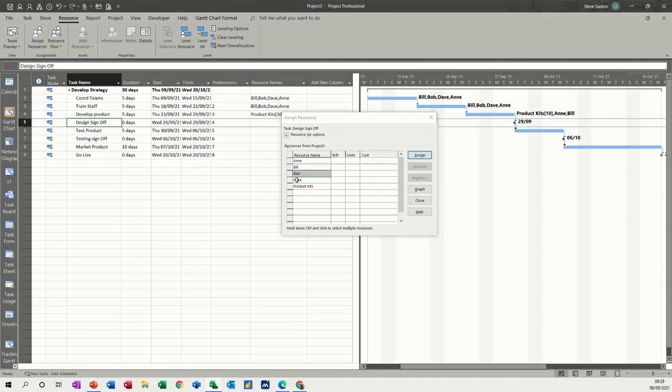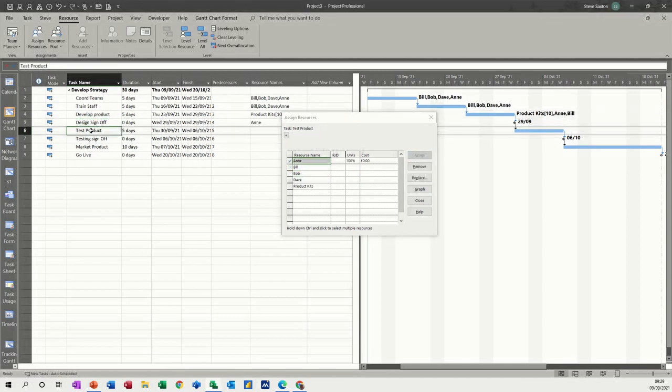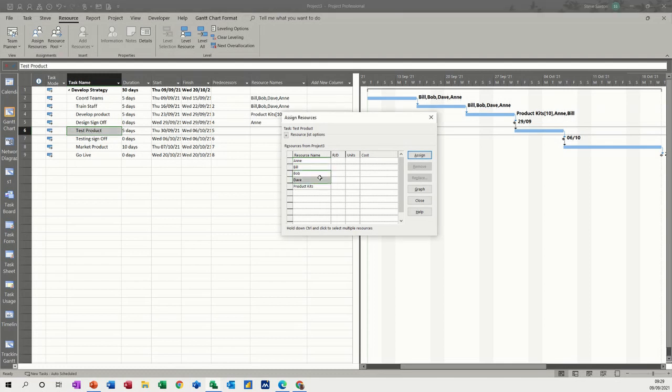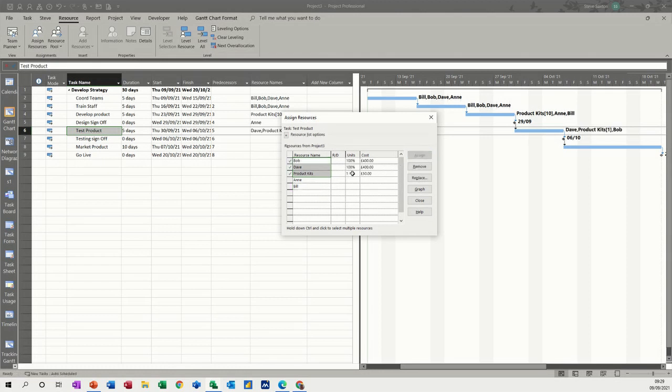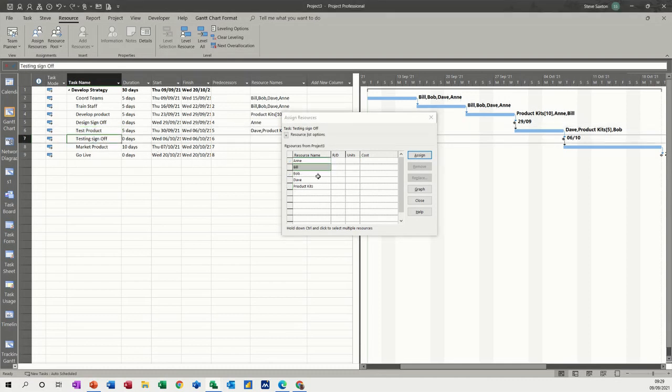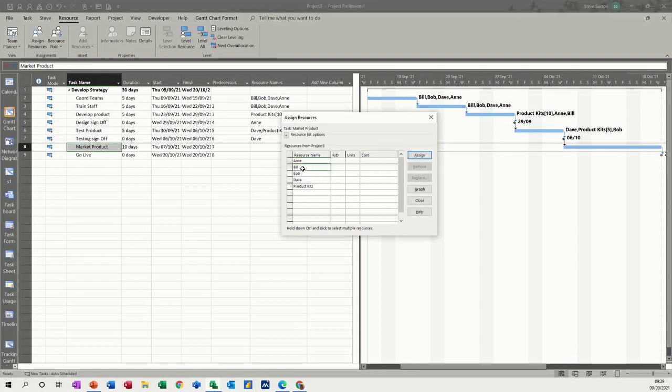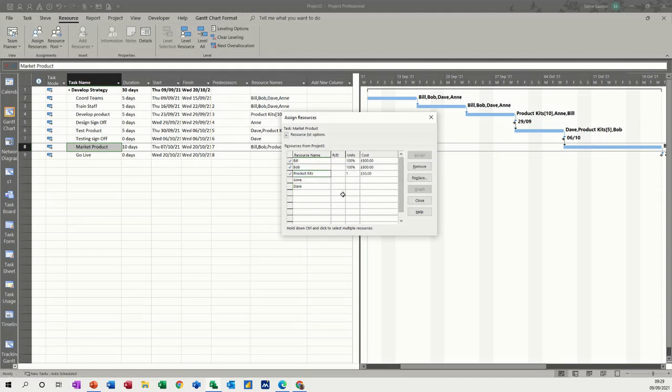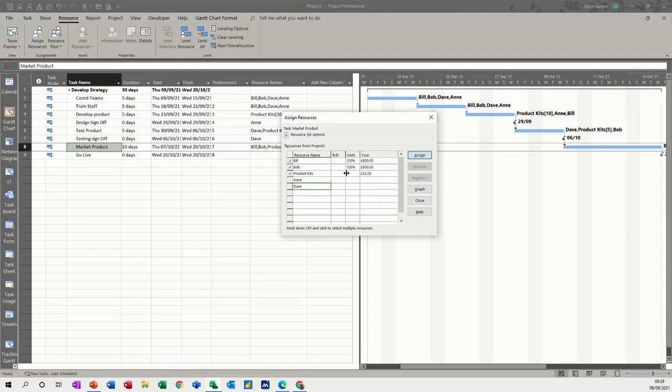Design sign off - that can be Ann. Test product - that's going to be Bob and Dave, and they're going to need some kits, so I'll do all three. They'll need five kits. Testing sign off can be Dave. Market product can be Bill and Bob, and they will need some kits to market, so I'll assign them 20 kits.